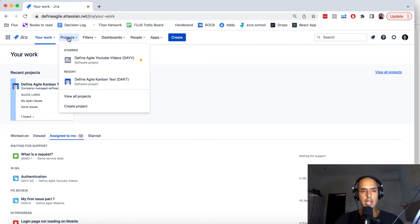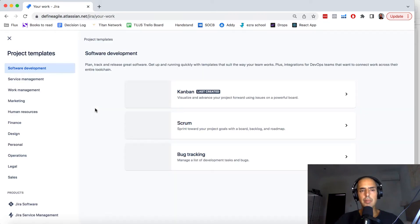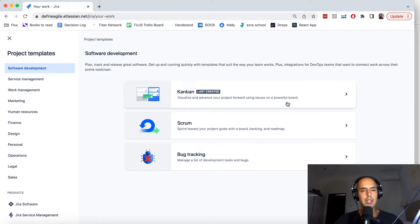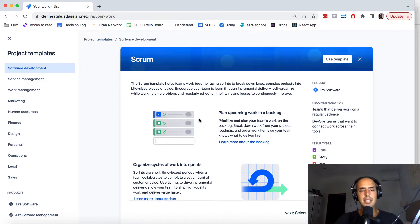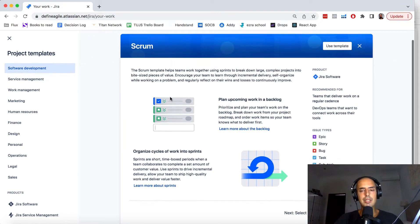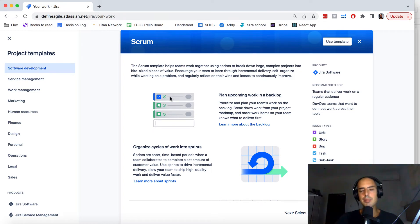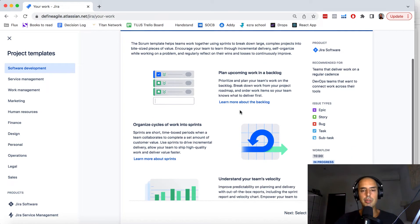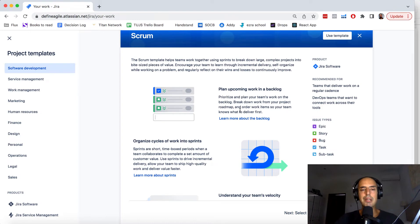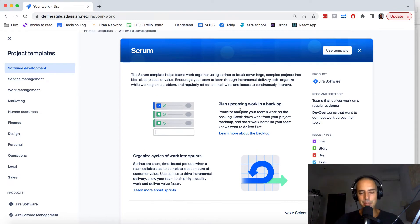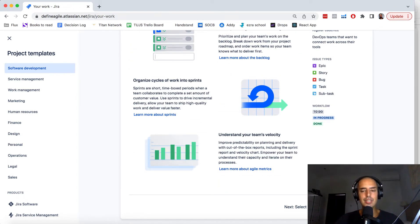We need to click on projects, we need to click on create a project because we will do a new project. And here you can select one Kanban, Scrum, well let's select Scrum. I recommend because if you have two of them, Scrum has active sprint and all the other things so it'll be useful. So if you want to have Scrum and Kanban in the same project, create a Scrum project first.